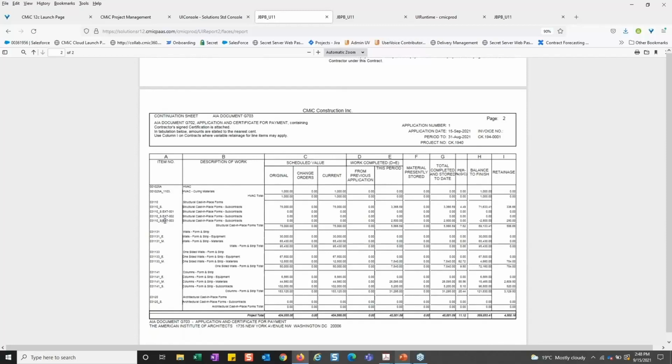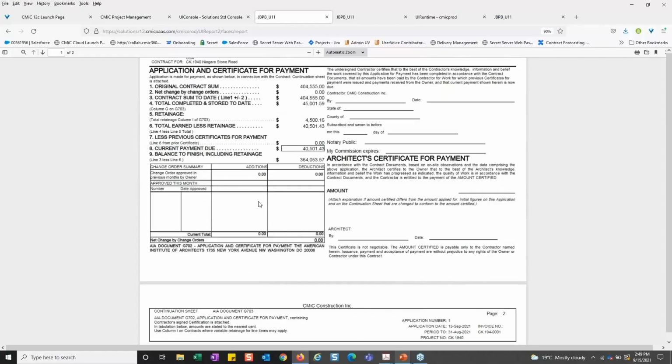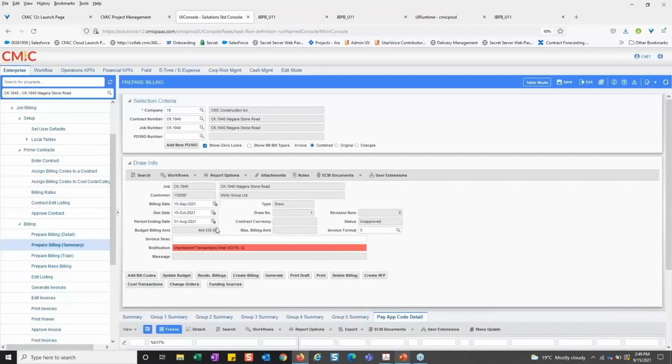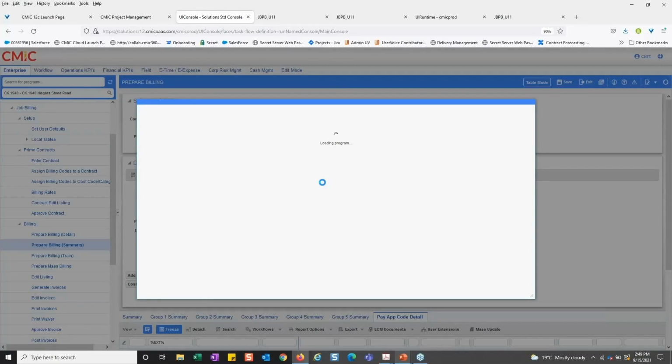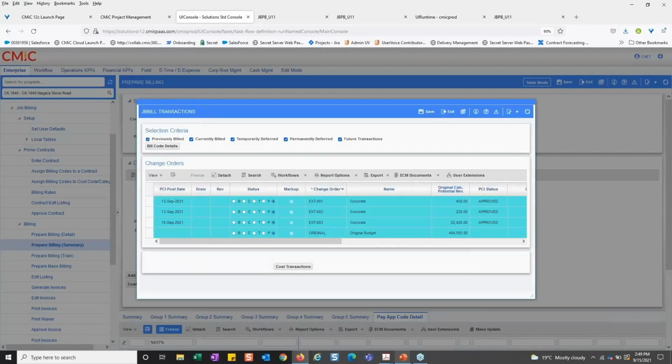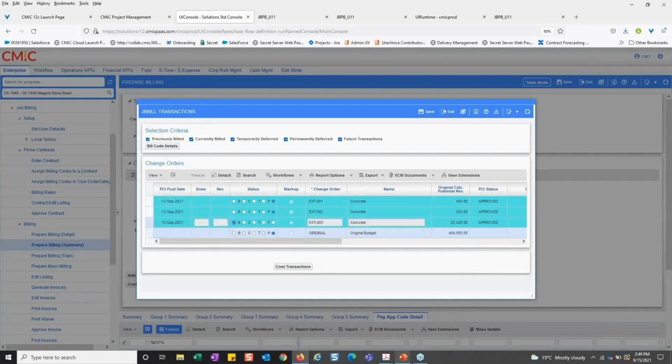Run the report. And if we scroll down, there's our change order there, right? As a separate bill code, we've got our 2,500 that we're looking to bill. And you'll notice up here in my G702, where I normally see those change orders, I'm not seeing anything there. And that's just based off the different controls. So just like with cost transactions, where I get this pop-up and I can control which costs effectively are in the bill, like I can override things that would automatically be there, I can come into these changes that I've created and flip on the flag.